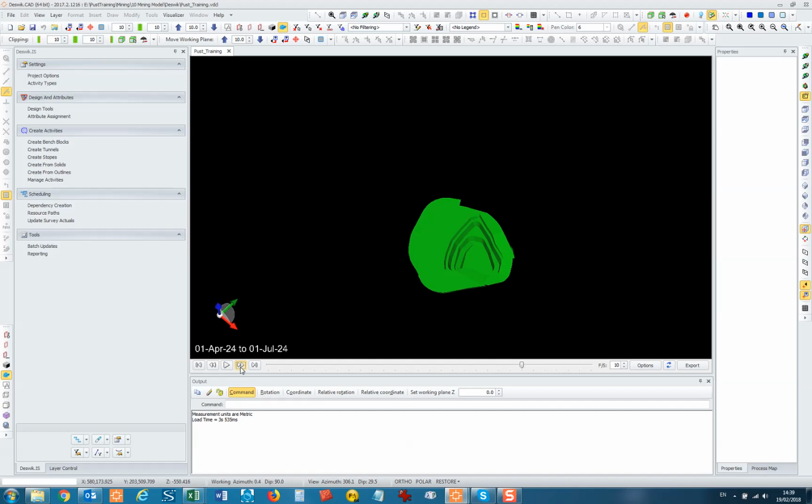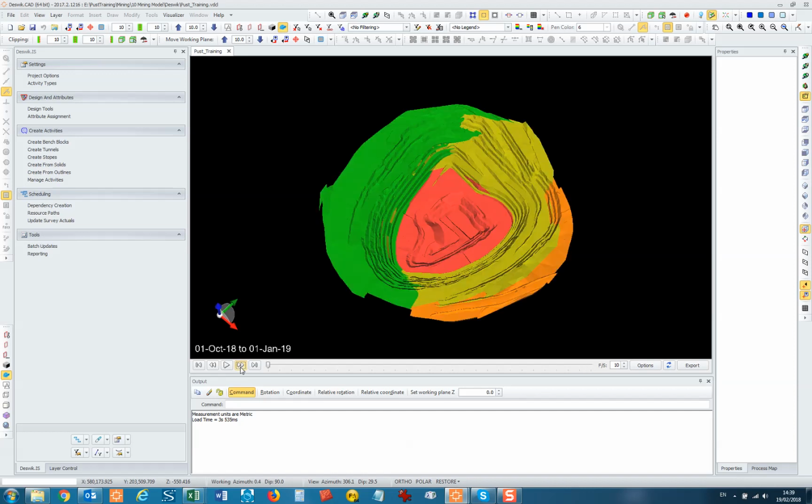So there you go. You have a schedule. So the balance is all about reporting total material movement rates by cutback, to make sure that you're not mining like 10 benches in one and none in another, and making sure that you're hitting the mill feed targets, checking how much material is going to the